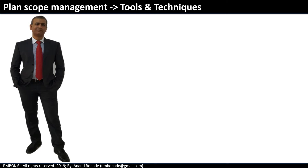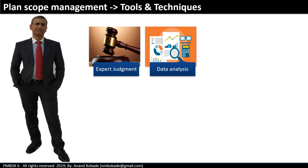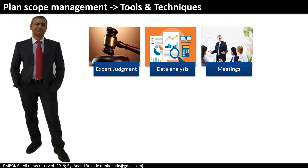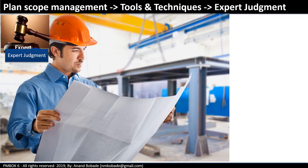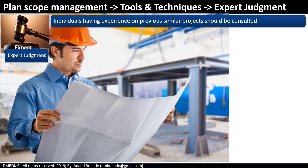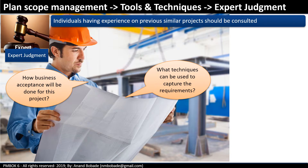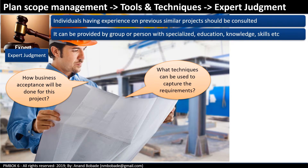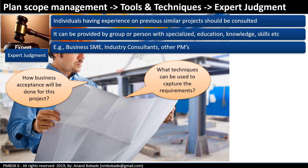The tools and techniques used in plan scope management are expert judgment, data analysis, and meetings — common across most planning processes. Expert judgment: individuals with experience on previous similar projects should be consulted. For example, an SME previously involved in an ERP project can help the project manager plan the scope. The SME may explain what techniques can be used to capture requirements and how business acceptance will be done. Expert judgment can be provided by business SMEs, industry consultants, or other project managers.